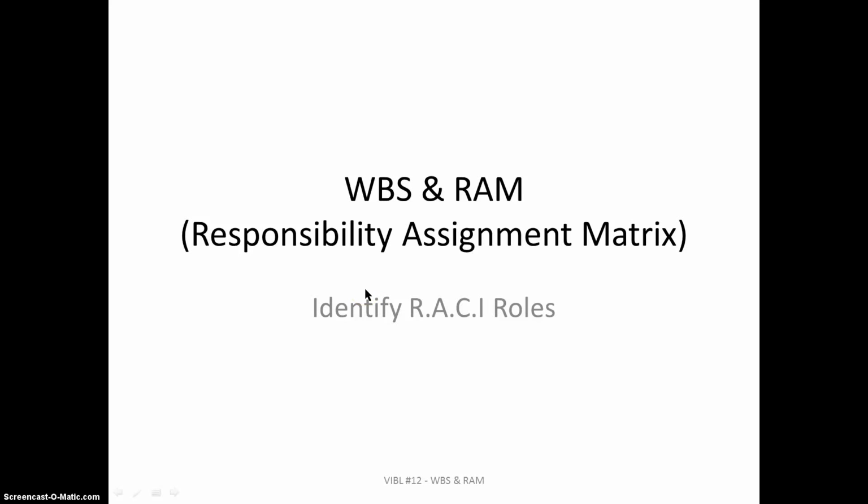Hi, my name is Jeff Pulliam and you are watching Video Blast number 12, where we're going to be talking about the work breakdown structure and the responsibility assignment matrix. The key understanding we want to gravitate to tonight is that when we've broken down the work to the third tier, the action or activity level, it is here where we can begin to describe the work in great detail, and in describing that work we're able to identify roles of the stakeholders involved with the execution of that work.